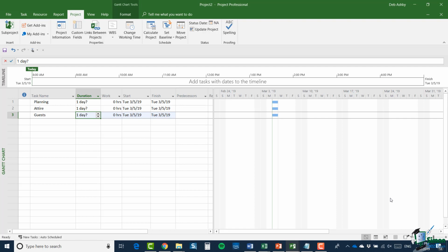A very important point as well here is that you don't actually have to enter the tasks of a project in chronological sequence. I could put all of these in any order that I wanted to. But the convention is that the tasks you expect to at least start first go first in the list. Now in the left-hand column here, you have something called a task ID. And as you'll see later on in the course, task IDs fulfill a very important purpose. But one way of looking at this is that generally speaking, the convention is that the tasks with the lower IDs correspond to the tasks that are performed earliest in the project.